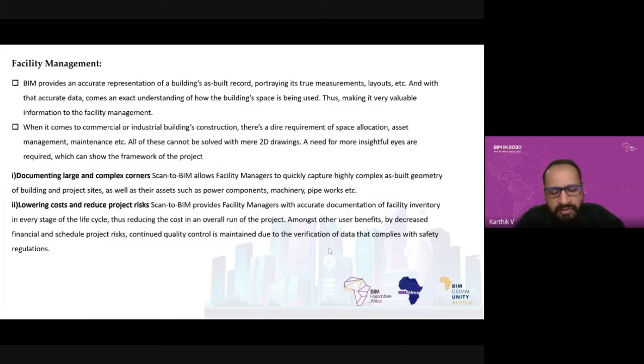Most of the projects have a contractual requirement on how we are going to submit our as-built model for estate management or facility management, whatever. So usually we submit the as-built model. Just imagine the handover time, the officers come and check what we constructed. Normally, for example the lights, the officer keeps the drawing and looks at the lights.